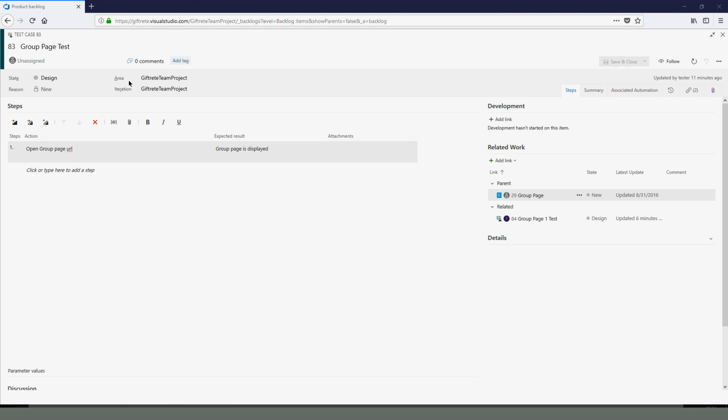Now, when a developer says this is done, in this approach this is your backlog, and it is dev done. Once it is done, the developer moves the story to done. As a QA, you need to look and say, okay, it's done, but it's not ready for me to test, because it's possible they have done some part but it's not ready yet. Once it's ready, they move it to ready for QA.